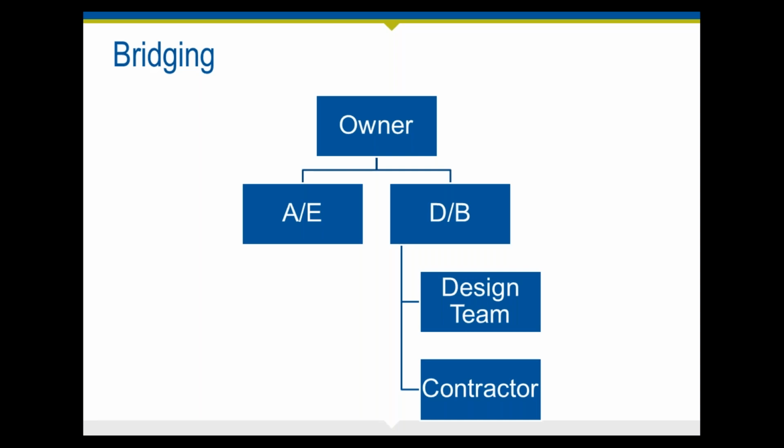So clients need to be made aware that you don't want to be trying to get a certification at the end of the project from a member of a design team that's under the design builder. We've often seen firms who work for the design builder and are being asked to certify conditions to the owner's lender, but that's really not part of their scope of services, nor does it meet the lender's requirements. So just be aware of those nuances.